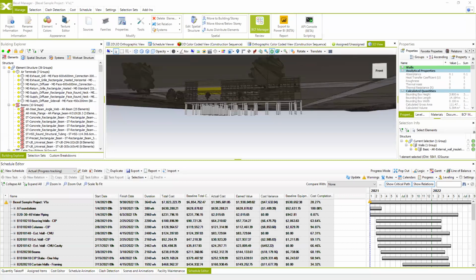How does it work with fixed price contracts? Does the program always recalculate the project? If you have fixed price contracts, these are used as baseline contracts. With a contracted fixed price, you can specify that these are prices which are not going to be changed, and you can link your schedule to that cost version, which is not going to be changed.